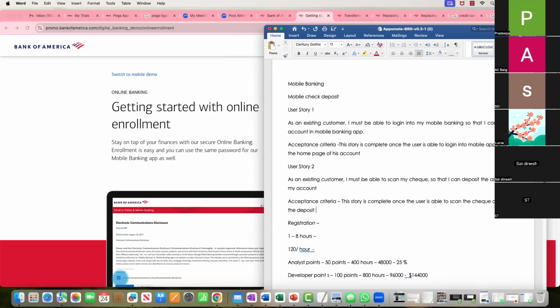The only thing from an analyst or developer perspective is they know the process, so it's easy for them to guide other people. But the time it will take to create another software, maybe for the first project it's 10 sprints, now it may take 7 sprints. But again, you have to analyze the complexity of this project, whether they're going to add any new enhancement, if there is an email notification involved.